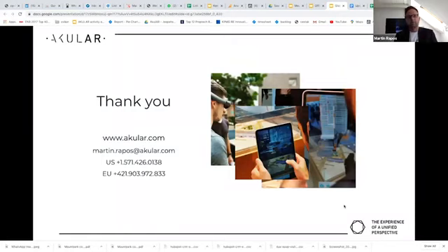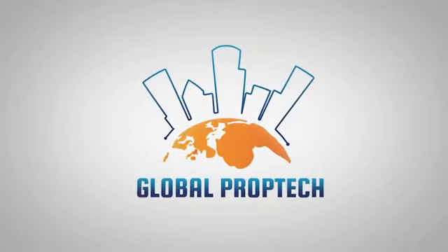Obviously, we work with companies to also layer it, so you would have your 3D model, and this may get a bit more technical, but you basically create versions of the 3D model with the layers, and then you just toggle different layers on and off as needed when you are on site. So while you are looking at something, you only see HVAC, and then you want to add the electrical system. So you just click, you add the electrical systems on top of that, for instance, for conflict identification.